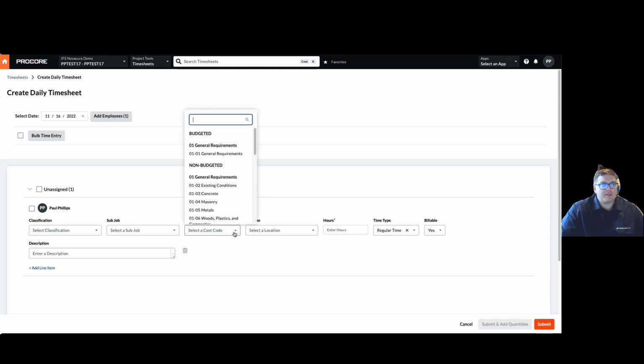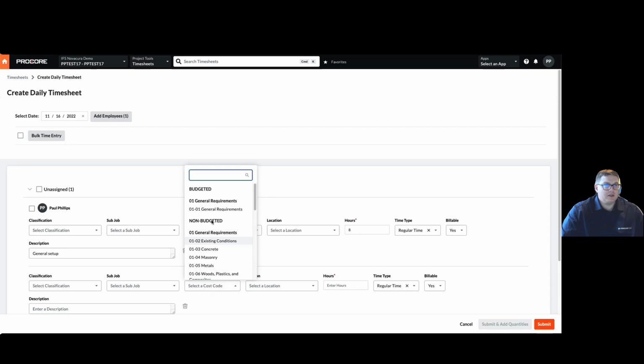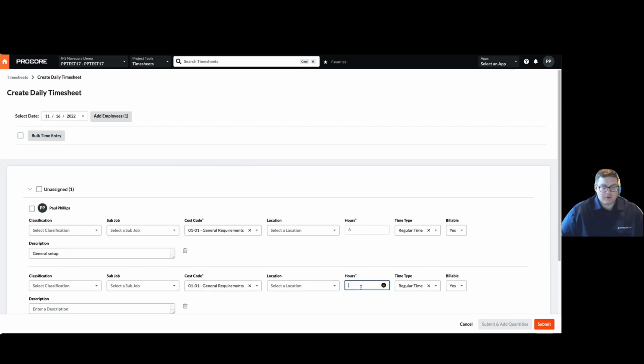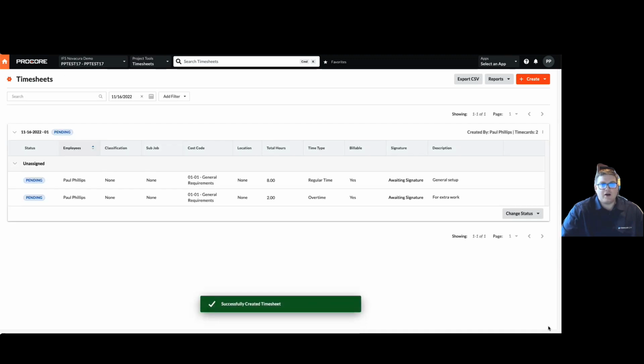So let's go ahead and report some time for Paul under that general requirements activity. Let's give it 8 hours of regular time for general setup. But let's also give 2 hours of overtime on that same cost code for extra work. And let's submit these. So once again, that's sending off a message to Novacura to sync the data between Procore and IFS.